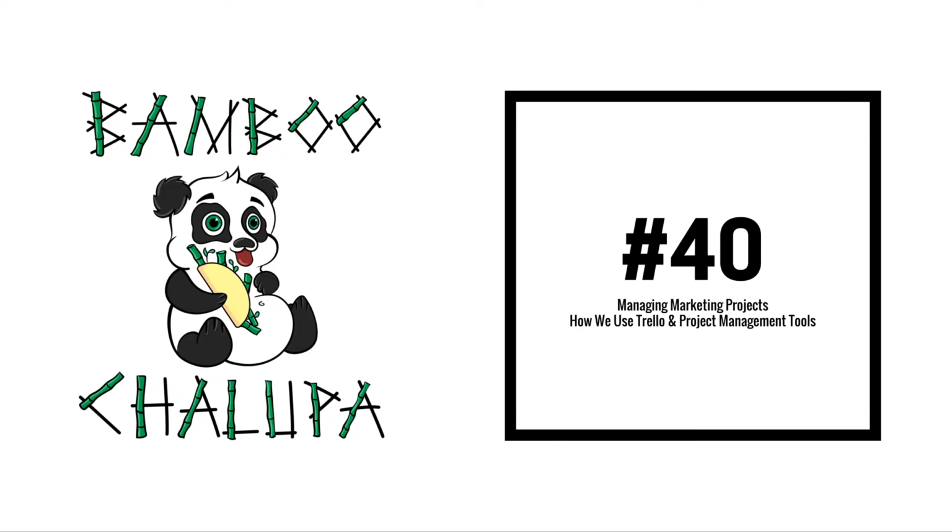So I think the to do, doing, done is a very simplified way of looking at it that makes a lot of sense. To take that a little bit deeper, for example, our content team, we've got a column for brainstorm, then we have our topic outline. Then we go for initial research. Then we talk about first draft, final draft, adding images, adding internal links, being able to do final QA when it goes into WordPress, and then publish.